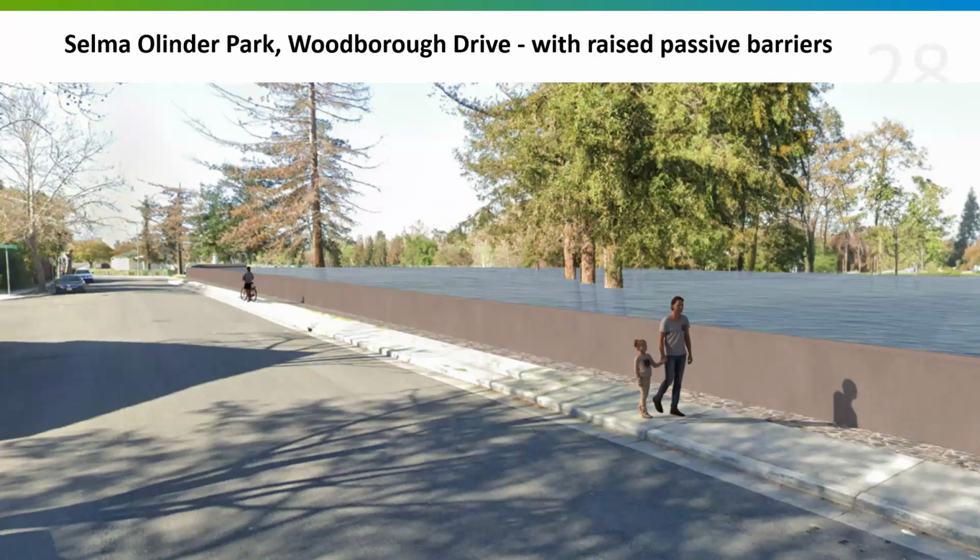Yeah, this is Devin Modi with Valley Water's Operations and Maintenance Group. As far as natural debris is concerned, yes, it is typically our practice to try to leave in creeks as much natural debris as possible to sustain habitat for fish and wildlife. If there is a need to remove that debris and it is natural, it is correct that we have to take stock of how much is being removed, and at some point in the future we have to replace that which is providing habitat, either in that same reach or elsewhere on that creek or in the watershed, and that does require permits. In emergency situations, we do have a little more flexibility to do the work to the extent it's safe for our crews to do so, but that's generally the approach we take.